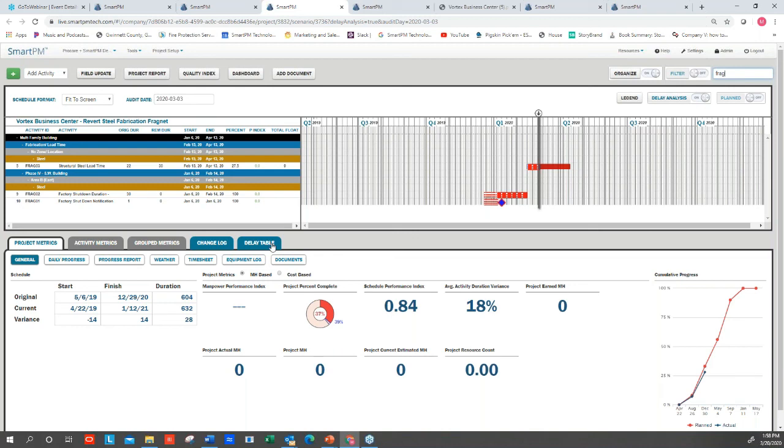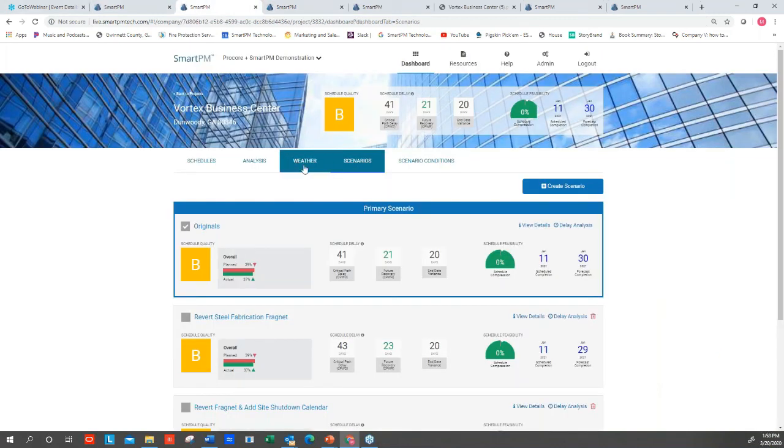It's, you know, when people are dropping in data and changing things and dropping in long durations and going, look, it should have been critical. That's not as strong as what happens if I do a what if scenario, drop it into the data as is, put in the as-built, rerun it as if it happened in real time. And what does that mean? And this is, to me, and this is what we've seen, is how we get people on the same page of understanding.